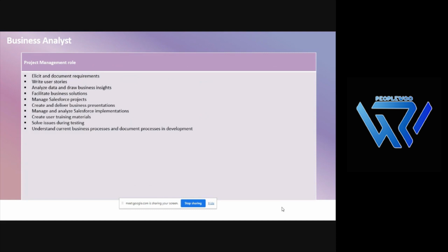Ideally people say that a business analyst will gather all the requirements before the start of the project, but practically it is not the case. Whoever the BA is, even with 25 or 30 years of industry experience, all that they can gather is around 70 to 75 percent of the requirements. So as you go through the stages of development and QA, you will groom your solution itself. There we will have tweaks on the requirement itself, and that is what solving the issues is.